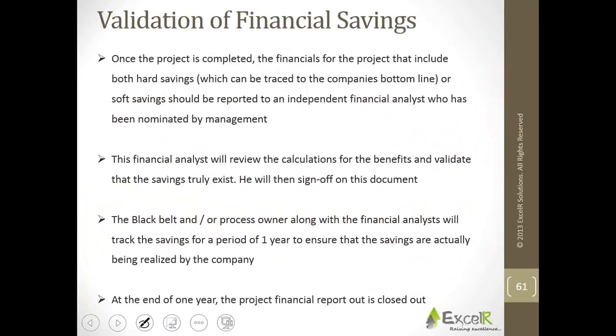Lastly, you validate the financial savings. Once the project is completed, the financials for the project include both hard savings and soft savings. When I say hard savings, it's usually related to money, cost. Soft savings are like the brand image of the company has increased, quality of the products has increased. If the quality of the product increases, obviously the sales are going to increase and there'll be a better brand image in the market. So all these things you will have to document, not just the hard savings.